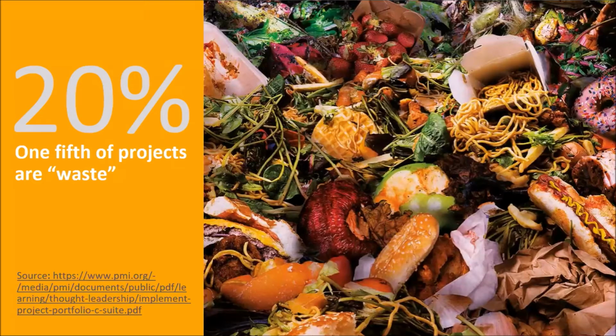Well, here's the first thing. This is data from the PMI. Basically, what they looked at was, across all portfolios, all industries, all sectors, all geographies, a typical portfolio will have 20% of the projects being so badly aligned that they should be stopped tomorrow, I think was the phrase. They're so badly aligned. Now, to me, there's a word for that, which is waste. These are projects we should just not be doing.